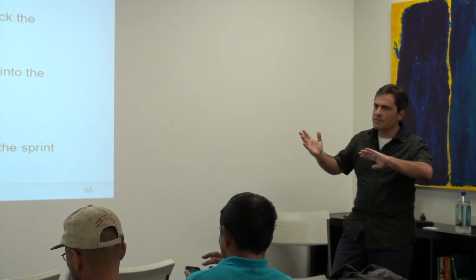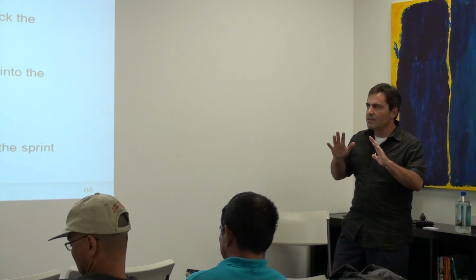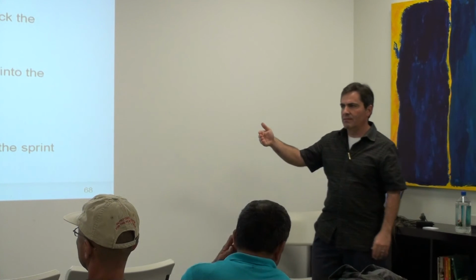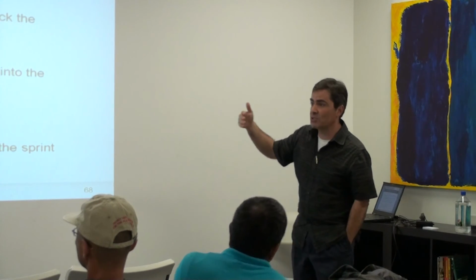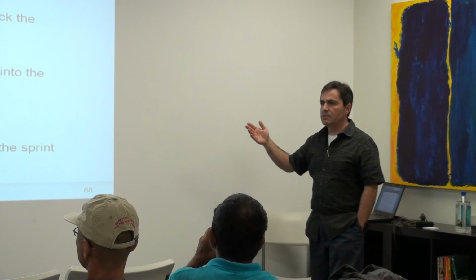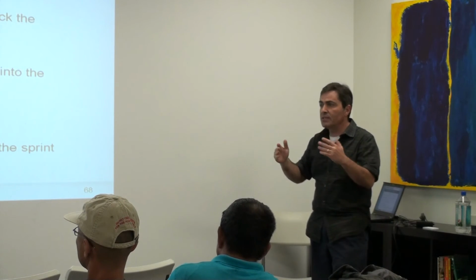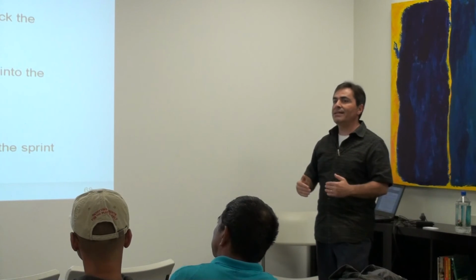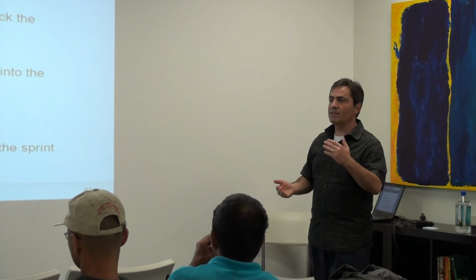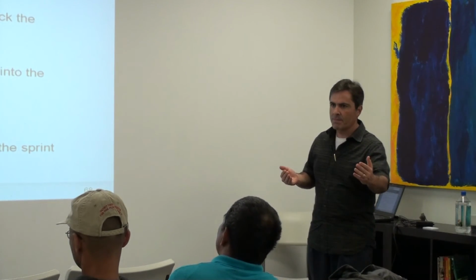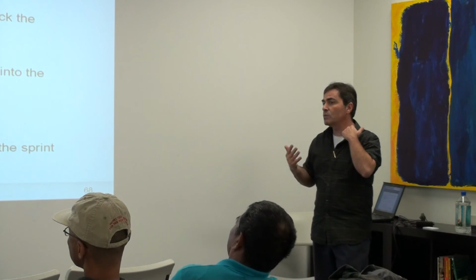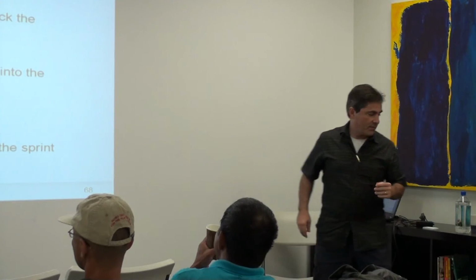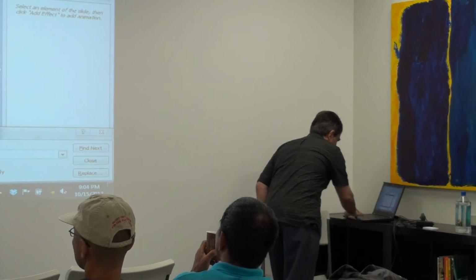So this also puts the burden on the product owner to say, okay, I'm going to work with the team to figure out what this is, but I've got to actually drive it to get to that state where the teams can actually work on it. We call it making it actionable. User stories, you can start out with one sentence. You can say, hey, I want to integrate with Salesforce.com. That's a good start. But in order to make it actionable, you've got to ask, okay, which part of your app do you want to integrate with which part of Salesforce.com? It's not a one-to-one mapping. So how do we want to deal with certain conditions? That all needs to be articulated. And the other concept is one of having a conversation.